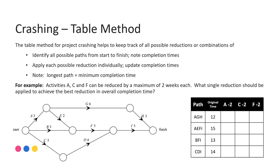The table method for project crashing helps you keep track of what reductions can be made and the impacts they have. We set up a table which contains all of the possible pathways from the start to the finish. I've listed each pathway and the durations — you can see the first one AGH there — mapping each of the possible pathways. In this case there are four possible different pathways from start to finish, each with what I call their original completion time — the completion time without any reductions.